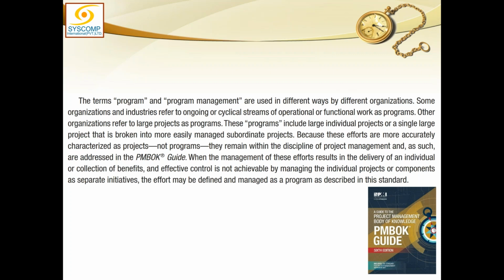So if you construct a school, the program will be responsible for running that school for that much time and reaping that benefit out of it, realizing that benefit, and ultimately reaching some bigger objective, some strategy it has to fulfill. So the program has its own benefit realization, and every project within the program is contributing deliverables which the program unifies and starts yielding their benefits, and those benefits are then consolidated and ultimately the program benefit is yielded. That's exactly why programs are of such great length. 10 years, 20 years programs are just because they have to realize those benefits. So the responsibility of benefit realization falls into the program manager's responsibility. That's why these are lengthy as compared to the projects.